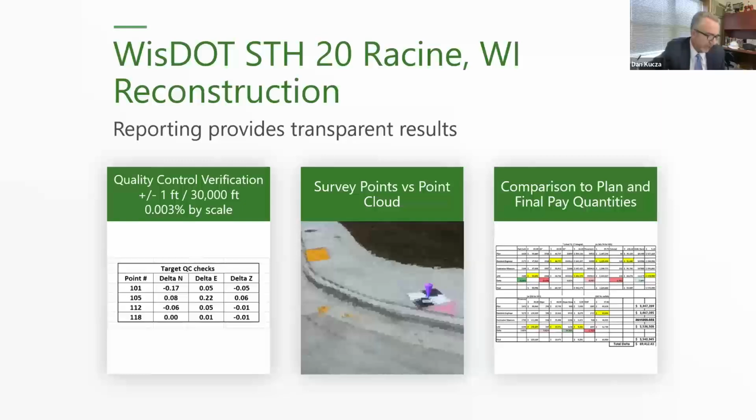So we went through and did all these calculations, and we found a number of areas where the contractor was actually underpaid. One area in particular was something called pedestrian curb, which is a very unusual item. It's hard to see, and we measured it. We came up with a quantity of 1,800 lineal feet. The funny thing is the designer had about half of what was really there.